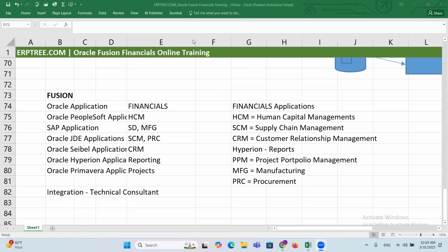Right? Everything is very much defined as a scope. Okay. Got it? That's how. Now you can proceed with the rest of the question. Yeah, so that's what I think, since you have already answered that. So when the scope is defined, if there is any deviation, there will be a change request for that, right? Correct. Okay. Thanks, Lakshman. Thank you.